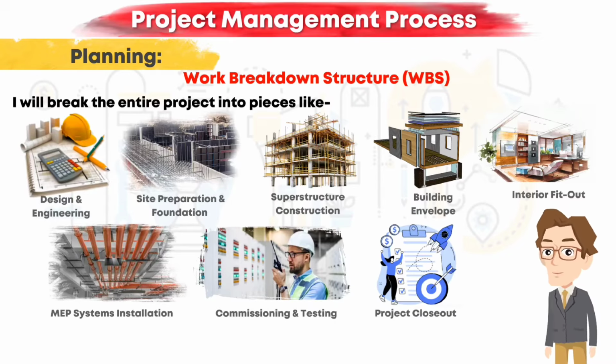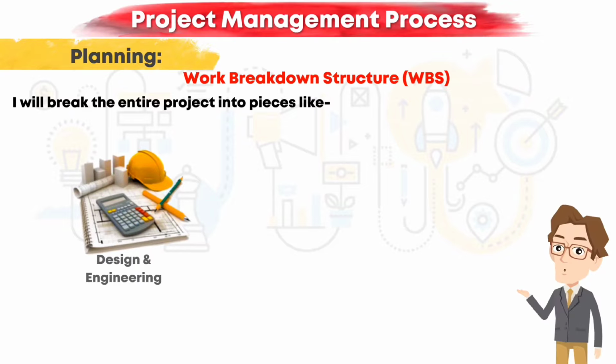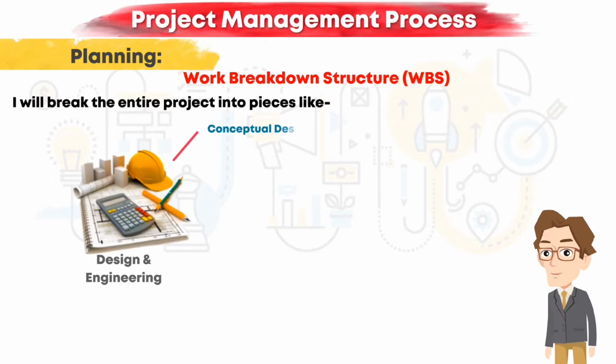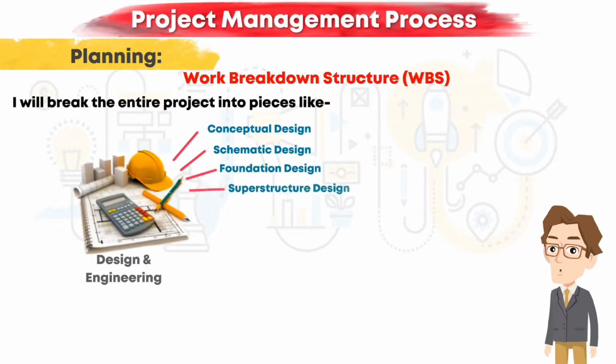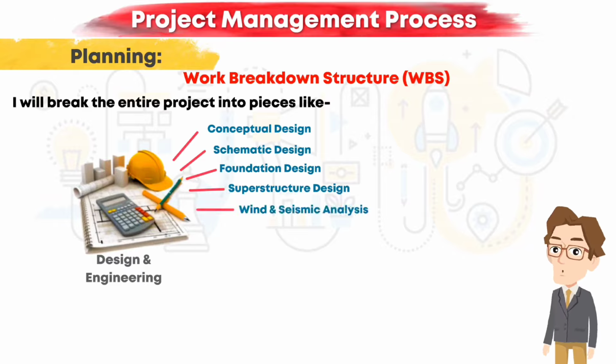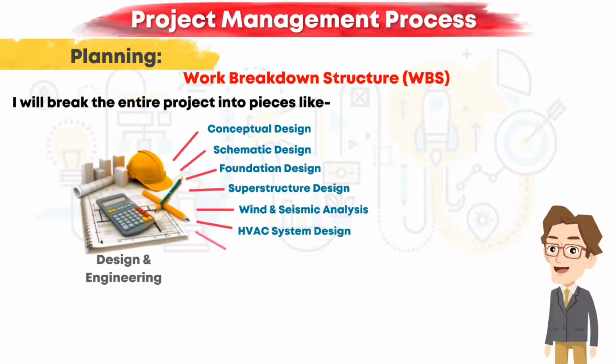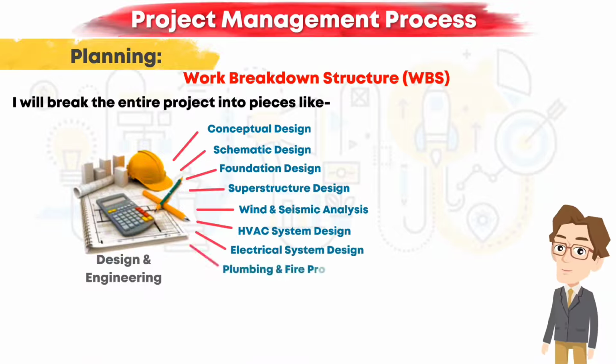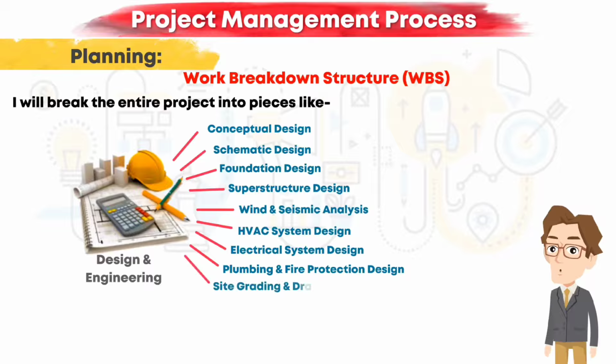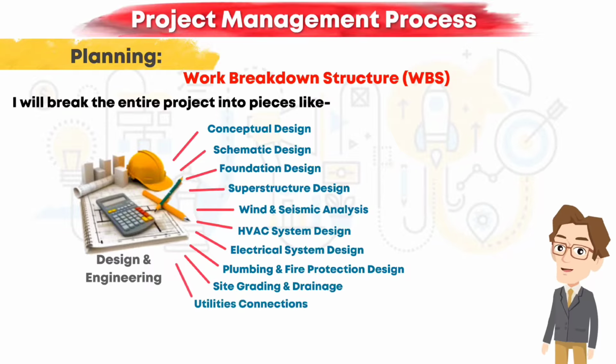If I dive deep into each piece, I can divide it into more manageable pieces. For example, if we break down the design and engineering part, we get conceptual design, schematic design, foundation design, superstructure design, wind and seismic analysis, HVAC system design, electrical system design, plumbing and fire protection design, site grading and drainage, and utilities connections. Like this, if I started breaking all the pieces, this video would be long and boring.